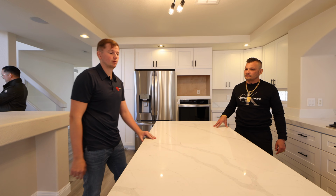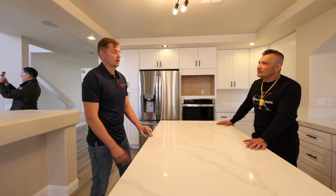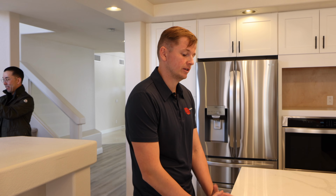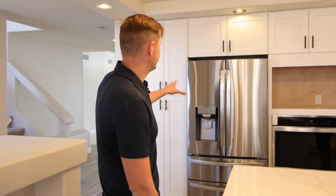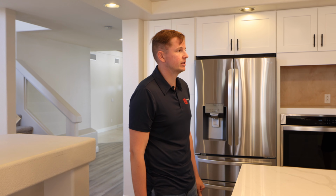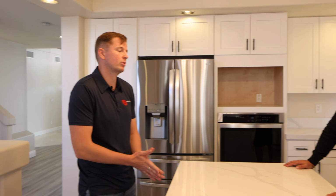Plus another tip for people who've seen it, appliances are backed out right now. So it's good to plan and order your appliances ahead of time. If you're talking about standard appliances, yes, you can get them on time. Okay. But if it's something high-end like Sub-Zero and stuff like that, they're backed out for about 6 to 7, 8 months.